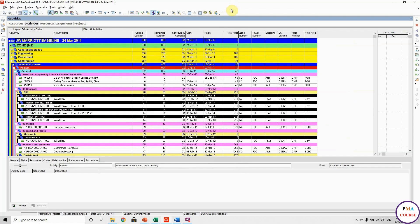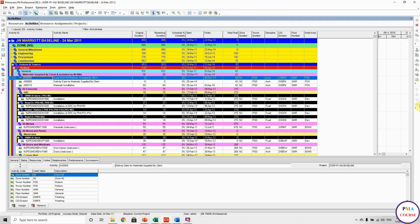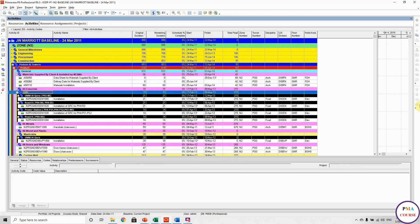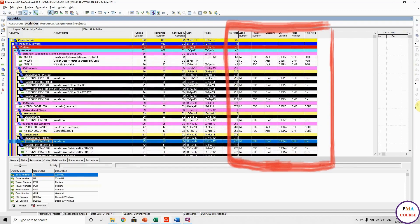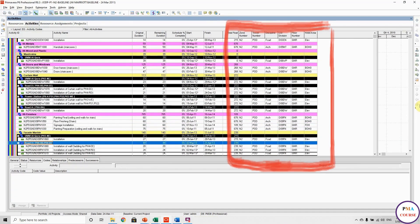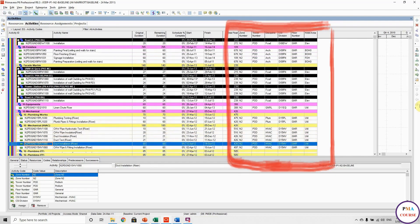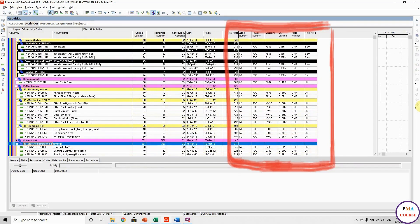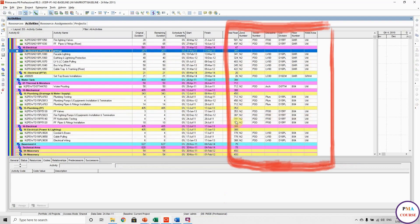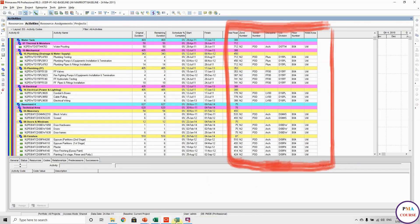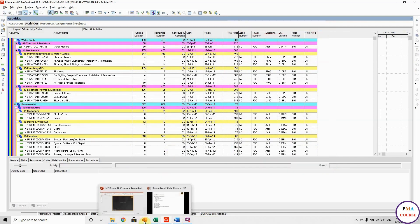Before we go further, there is a very important note: you have to apply all the codes to all activities. Don't leave anything blank. Here you can see there are values in all activities — all codes have values, nothing is blank. This is very important because later when we use these codes in Power BI, I don't want to find a lot of blanks. If something applies to all, you can put 'general' — just don't leave anything blank.